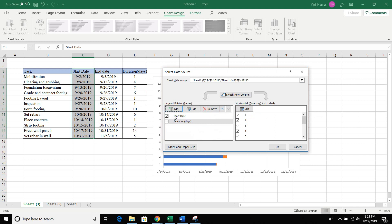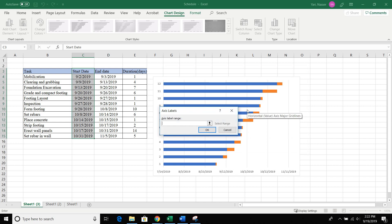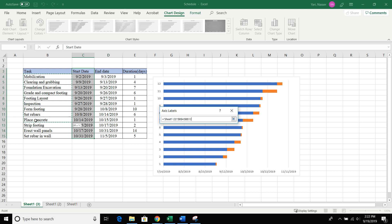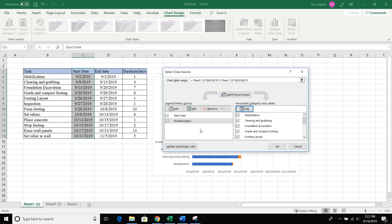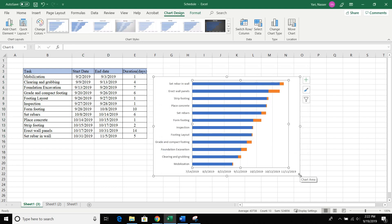We're back to the Select Data window. You can see there are Add, Edit, and Remove buttons. Go to the second one that says Edit. Once you click Edit, this window opens up and it says Axis Label Range. What we're going to put in here is all the activities under the task column. Put your mouse on the first activity, which is mobilization, click and hold, and drag all the way down to the last rebar entry. Let go, click OK, then click OK again.